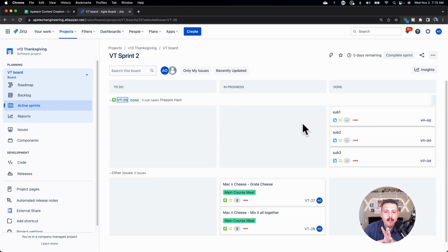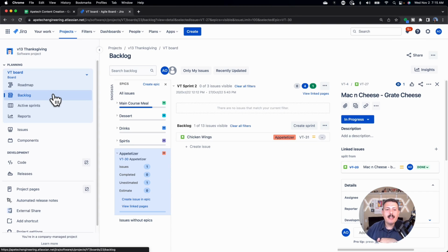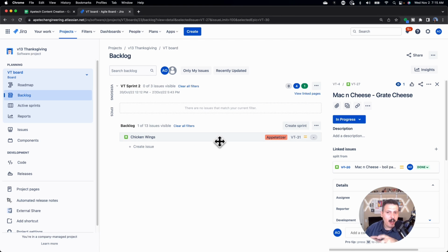The other thing, though, that you should keep in mind is when you do rely on subtasks, they will show up on the board. As you can see here, I have my story and I can see my subtask below it. And so this works really well because it works as a visual so that your team can be working off those subtasks. But what you don't get from the planning perspective, you don't get the subtask to show up on the backlog. And so this could be a little bit problematic for some scrum masters that don't understand that the subtasks aren't part of their domain.